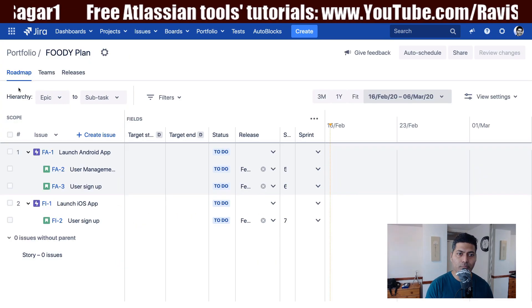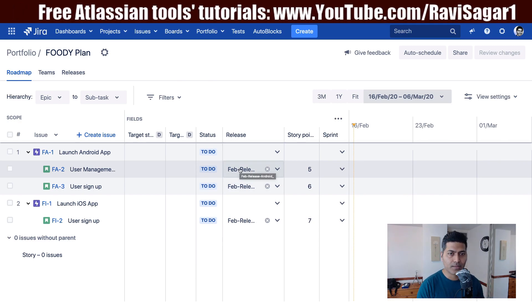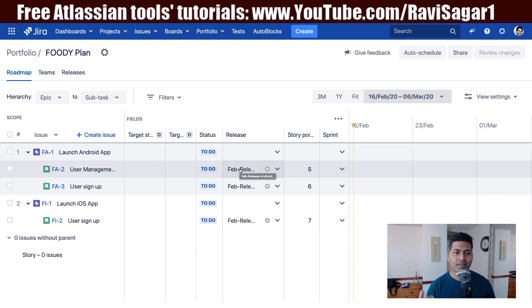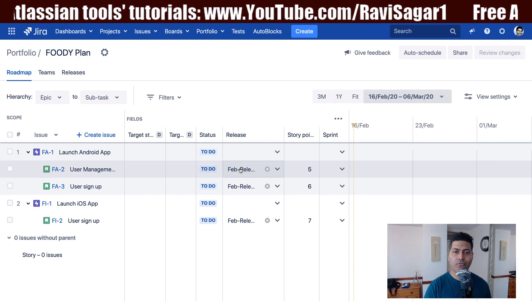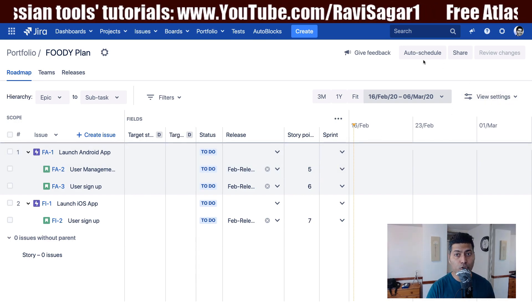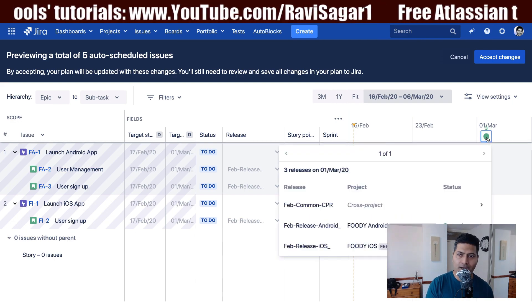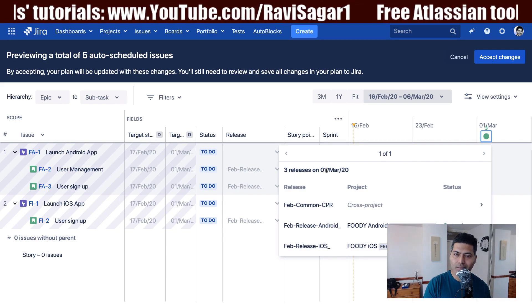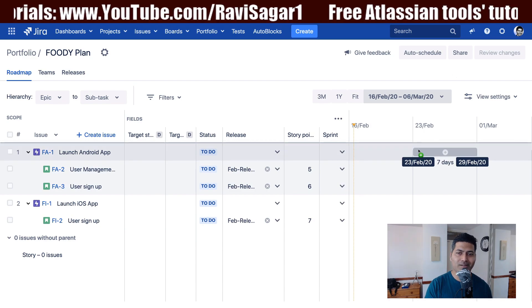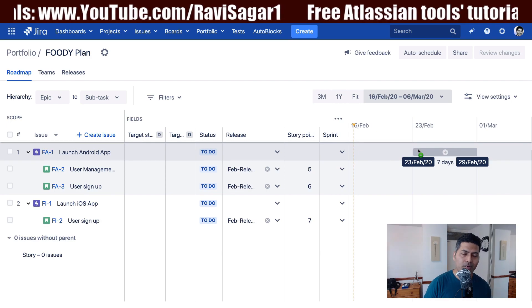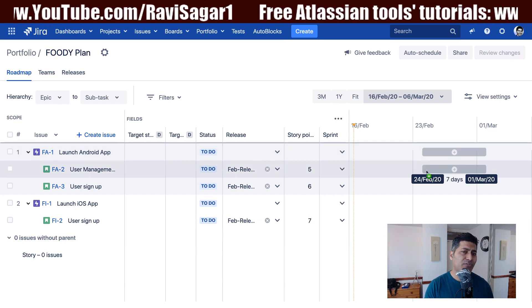I want to make sure that my releases are planned so these stories are assigned to the releases and the end date falls somewhere in the month of February. Now if I click on the auto schedule button, I get some indication of the date. Yes, we do have some indication — with the current situation you will be able to release on the first of March. That is actually not bad; we are releasing within roughly two weeks, which is near the end of February, but going just one day beyond. I think I'm actually fine with this.